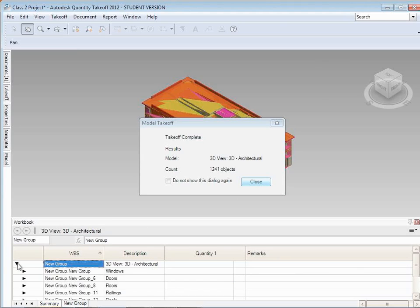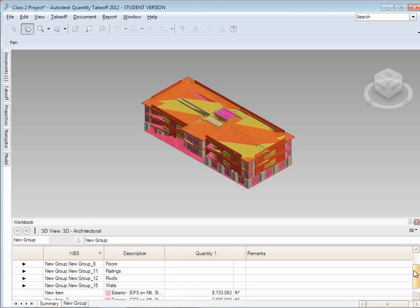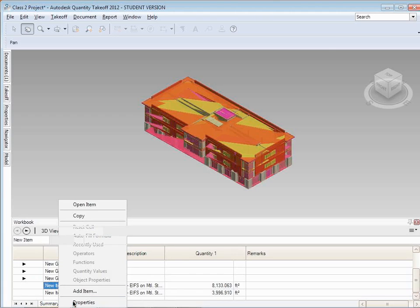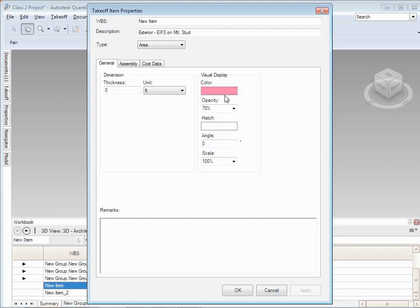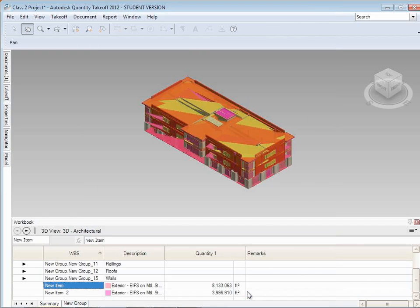Okay, so there were 1,200 objects in there. I'm off by about half. Where they are showing up right now is down here. I have all the doors and the windows and the railings and different items like that. Now, for every different type of element, you'll find there are different ways of estimating it. For example, walls, we tend to estimate based on square footages. So if I choose a wall type, and I choose the properties of that, I can sort of say that, yes, it is going to be an area-based calculation. And I can put in some cost metric that I want to use. I can get very detailed, breaking it down by material and labor and all the subcomponents. Or I can just go ahead and put in a single cost. For example, if I want that to be $50 per square foot, I'd apply that there.